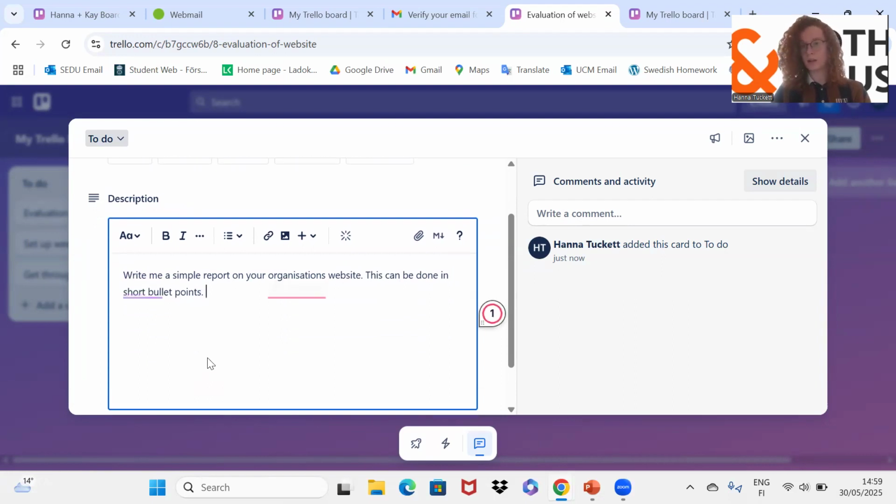And then we need to set up how much the estimated time of completion will be. So the shortening for this is ETC, estimated time of completion. And this will be set up hopefully by your manager, but if your manager has just given you a task, then you as the worker have to give an estimation of how much time you will use on this task. Now, an important point is that one task should never take more than 3 hours.